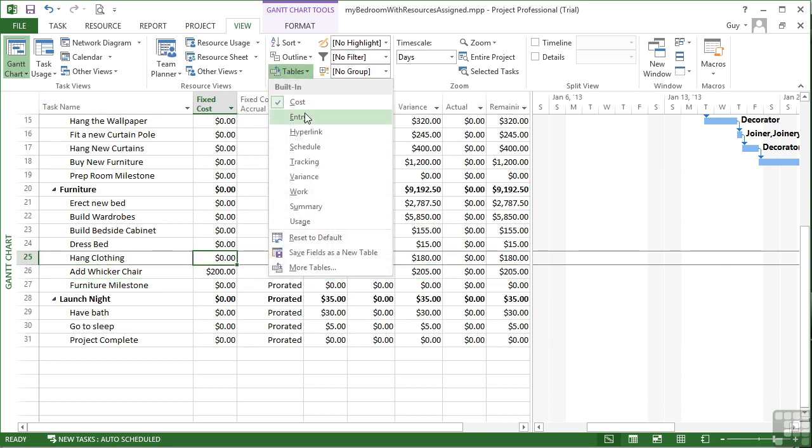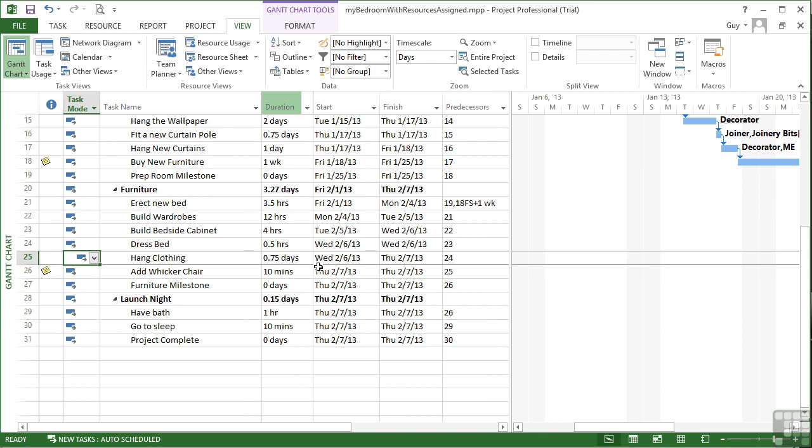And I change back to the entry table to carry on with my work and I see the little post-it note there explaining the fixed cost. So that's how to add in fixed costs to your project. It can be added to any of the tasks, any of the summary tasks, or even, as you've seen, to the actual project summary task. And that value will then get added in to the total costs of the project.